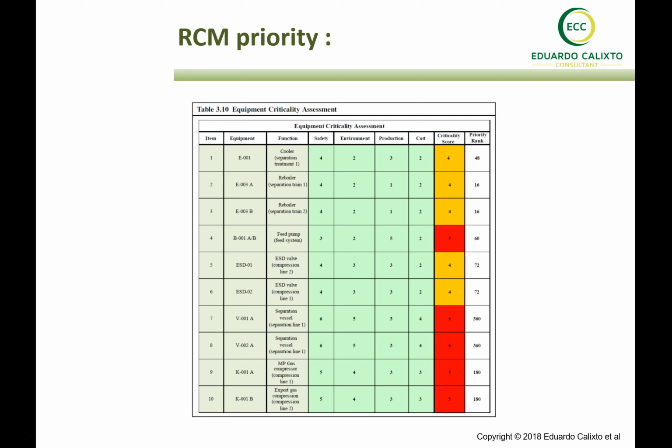For a compressor, we need more than one day, 2 or 3 days to go through the compressor, turbine, system, subsystem, and surrounding equipment. So for entire plants, we sometimes need more than 1 month, 2 months, 3 months.